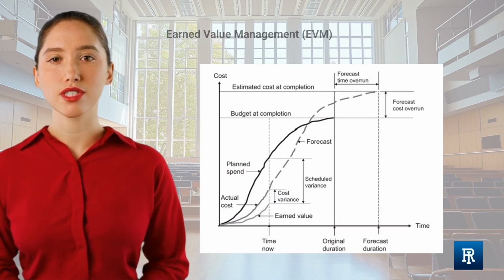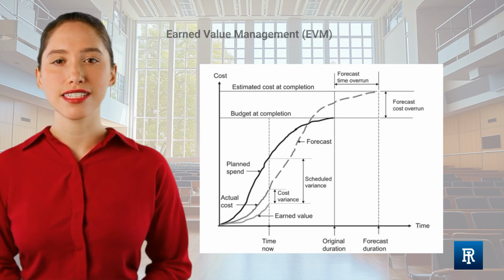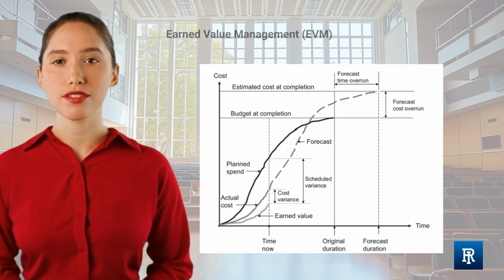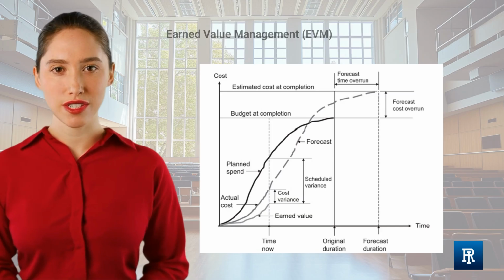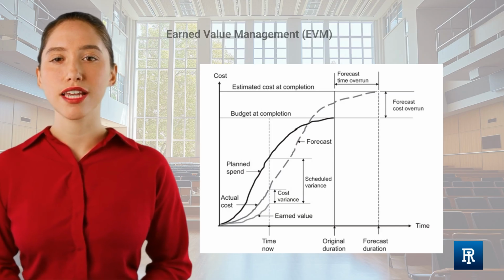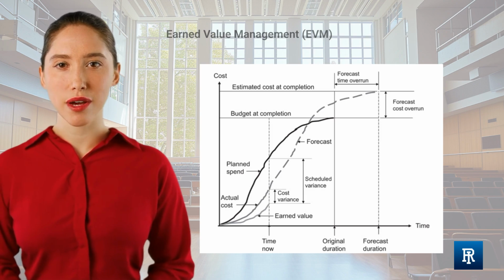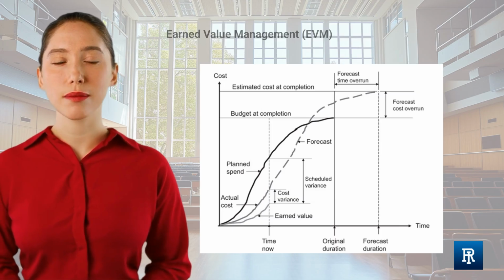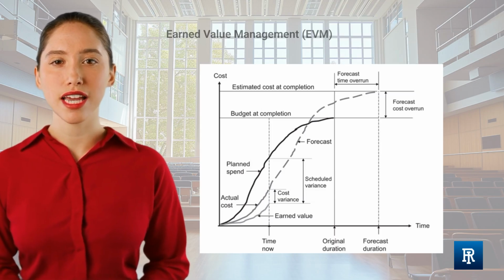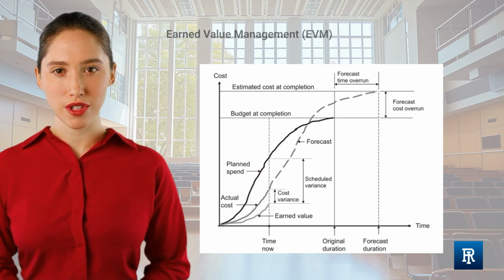If your progress measurements are fuzzy, if the clerical backend isn't maintained, or if big chunks of the budget sit in lump sum purchases, the numbers wobble. Add in the fact that EVM ignores risk and uncertainty entirely, and you can see why blind faith in its charts is risky. Bottom line, use EVM as a radar screen to spot trouble early, then combine its signals with solid risk management and a team that actually understands what those curves mean.